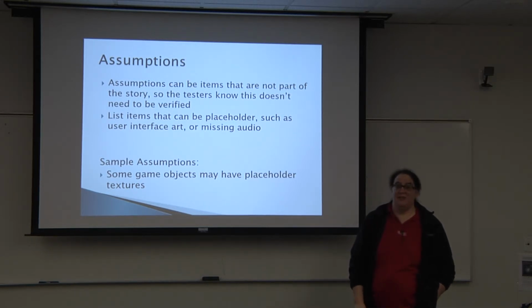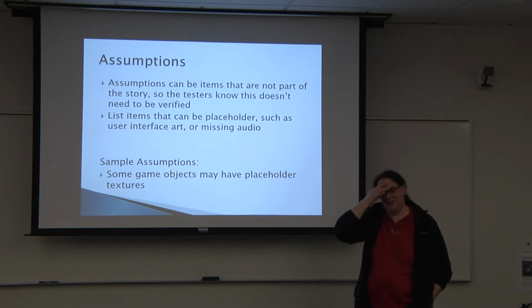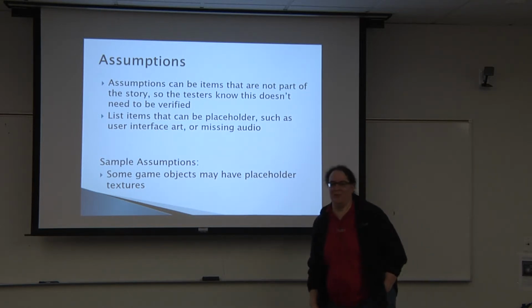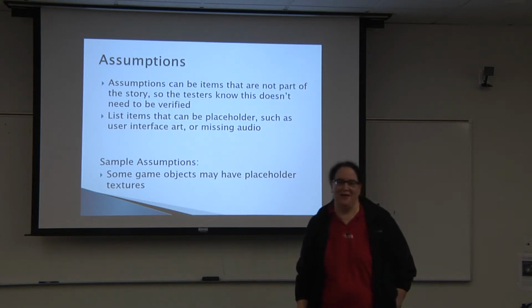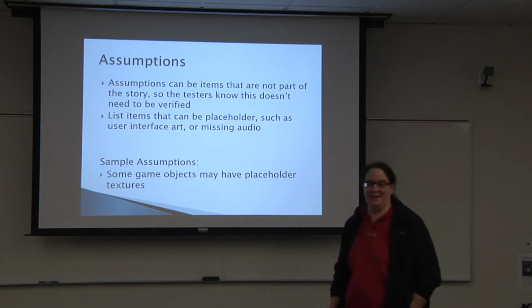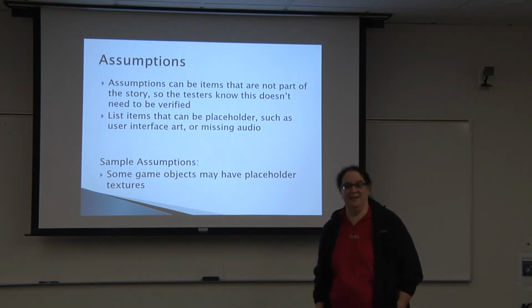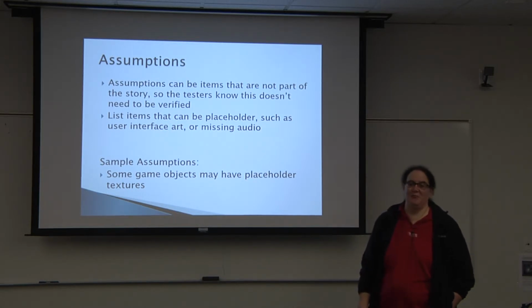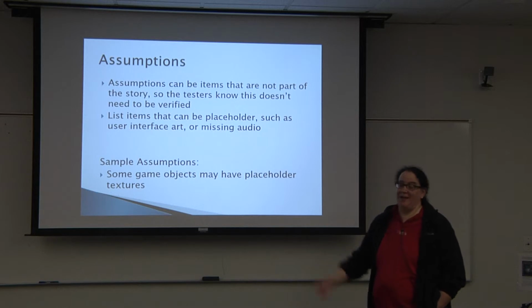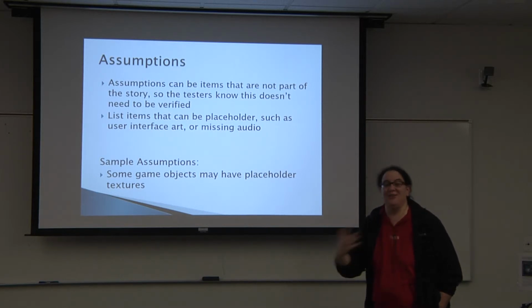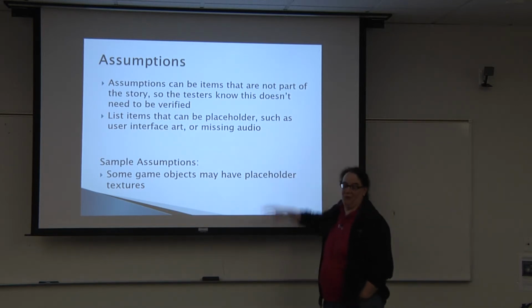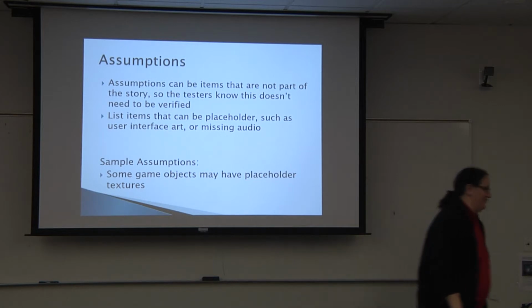Because we shipped a mission starring The Thing with the low cost that I had entered for the QA department so that they could test it without having to load up their accounts with lots of fake money beforehand. Never, ever, ever do that. We shipped it. It made it all the way through QA, and none of us caught it. And so it was supposed to be a purchasable item that was basically free. And at that point, I told QA, I will personally add money to your accounts. We're never doing this again. But this is just a general caveat of be careful with placeholder, because sometimes you ship it painfully.